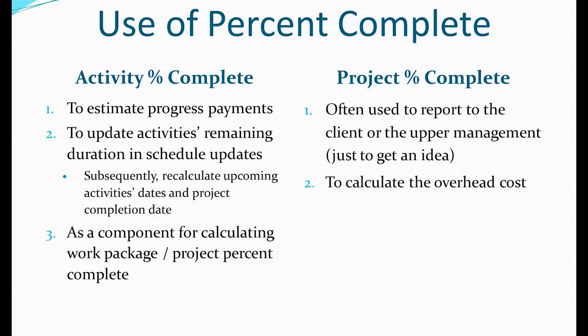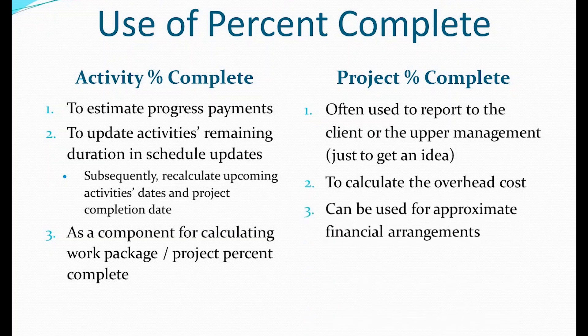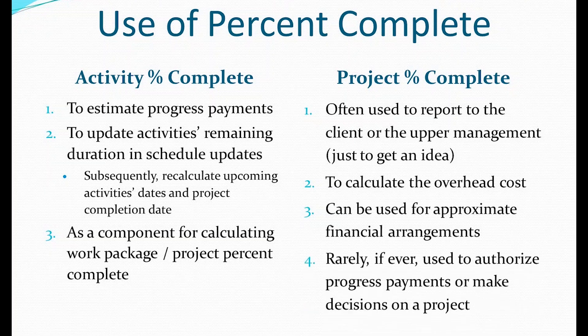We use it to calculate the overhead cost because overhead is proportional to the duration of the project. Sometimes it can be used for approximate financial arrangements, and rarely, if ever, used to authorize progress payments.